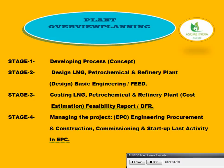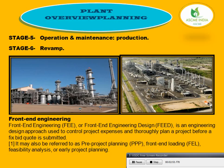Plant overview planning. We have five phases. First stage: developing the process concept. Second stage: designing the LNG petrochemical and refinery plant — design basic engineering FEED. Third: costing the LNG petrochemical and refinery plant — estimation feasibility report, DFR. Fourth: managing the project — EPC, engineering procurement and construction, commissioning and start-up as the last activity in EPC.